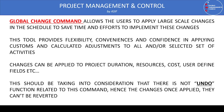Once we are applying Global Change, we should be aware that there is no undo available. Once you commit the changes, be careful and be confident that no harm is done and the changes are happening exactly as expected. For large projects it is very difficult to go and check all activities, so it is advisable to make a copy of the program before applying Global Change, so that if anything goes wrong, the original program remains unaffected.